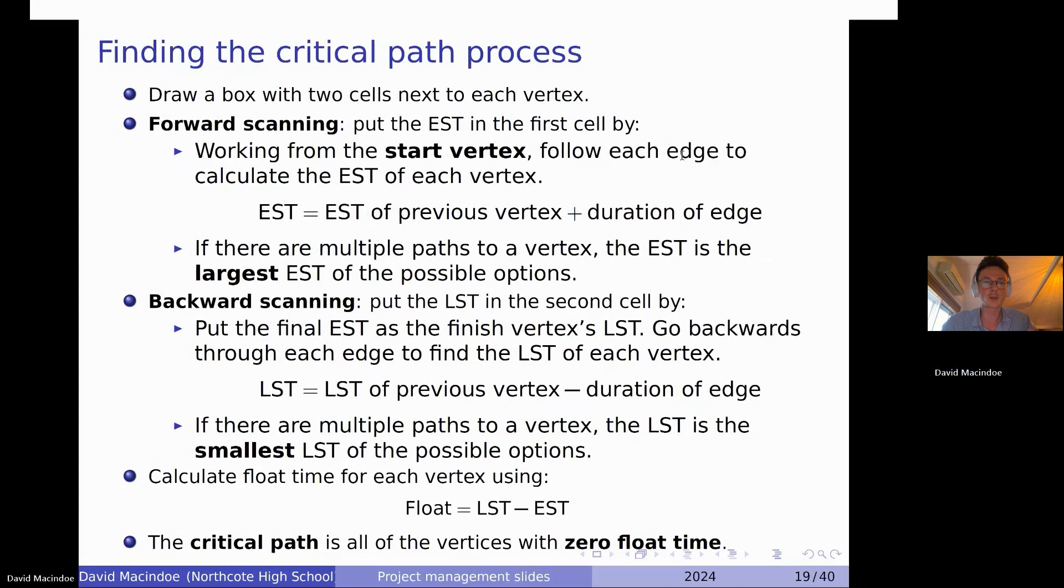So forward scan through the whole network, put in all of the ESTs in the leftmost box. And then what we have to do if we're going to get this critical path is do some backwards scanning. The first step in that is just put in whatever your final EST is for that finished vertex, just put it as the finished vertex latest start time, the LST. Then we're kind of working backwards. So as we go back across each edge, we are subtracting off the previous LST the duration of that edge. And again, you might have these situations where you've got two different paths to a vertex. And then what we want to do is use the smallest LST. So I think this is probably where students might get confused that when we're forward scanning, we're picking the largest option and when we're backward scanning, we're picking the smallest option.